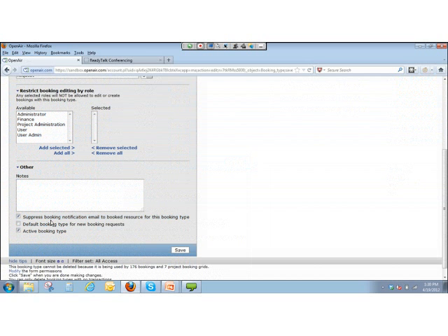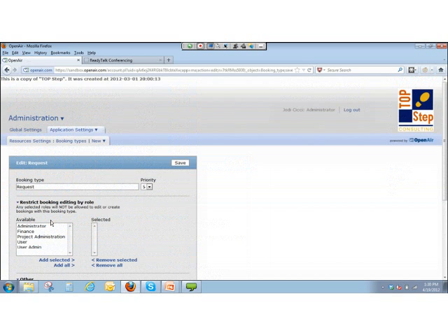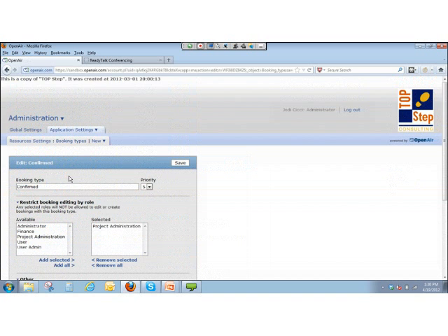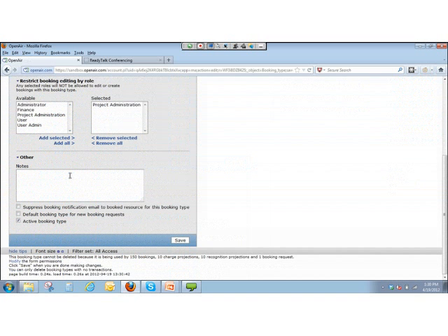It's premature to notify the person. And that makes the email communication cleaner so that when someone does get an email from the system about resource bookings, it's confirmed, which means they're actually supposed to be doing work and they should follow up with the project manager, and therefore the booking notification is useful versus just being noise filling up the inbox.